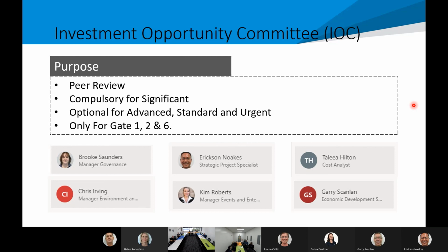Absolutely, and this is where I guess why this meeting and training is so important, because these decisions, as was quite rightly pointed out, there's 4 decisions typically that you can make. That is approved and proceed to the next phase; approved but not now, so hold till future, and that could be a number of reasons why we hold; not approved, so pull the plug. This is not viable anymore. We do not need to do this. This can't happen. It's pull the plug. And the 4th option is always, I need more information to make the decision.